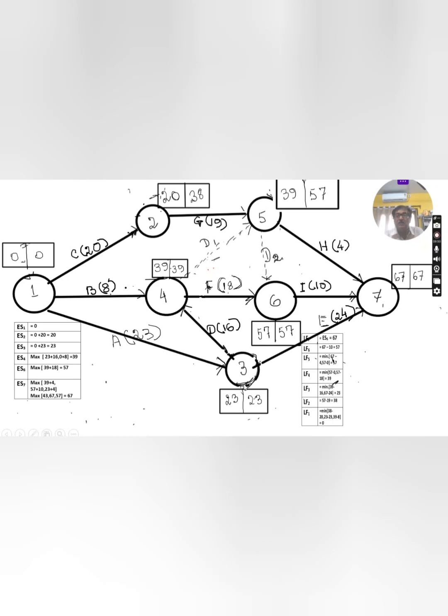The least time, 23 days, will be required to reach here, plus 16 days required to complete this task. And how much total time? 23 plus 16, 39. You have to take the maximum of these two, which is 39. That's why the earliest start time for ES4 is 39.